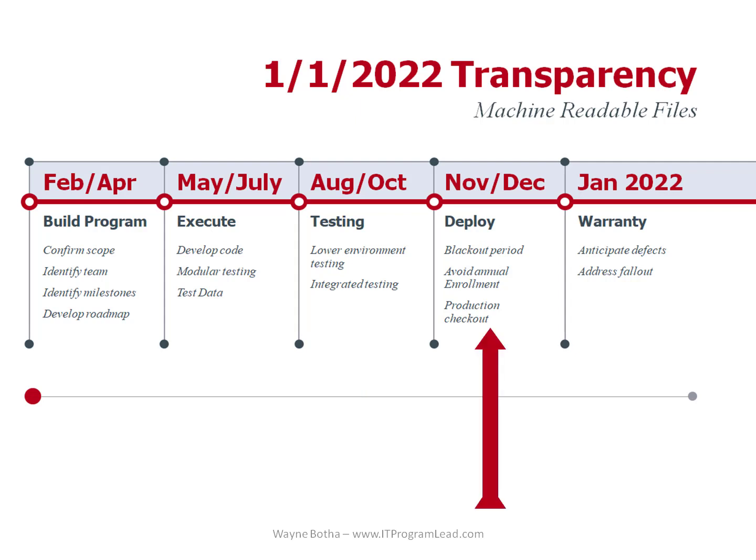A few things happen around the end of the year that could impact your program. Firstly, we have the Thanksgiving break — many people take time off during the holidays and work often slows down. Secondly, there is a blackout period from mid-December to early January when you cannot do regular production releases of your software. Thirdly, you might need to consider the annual enrollment period which could impact your systems. After the go-live in January, there will be support needed — there might be defects in the code or misunderstood requirements that will only surface in the production environment.